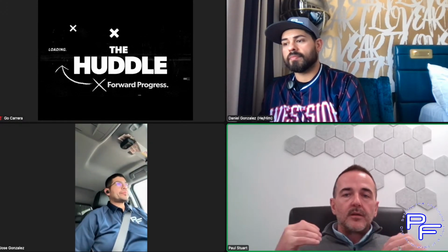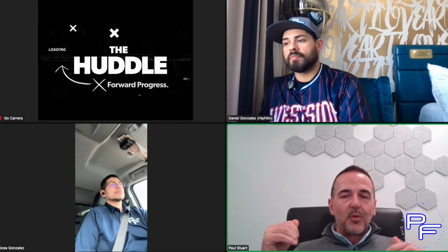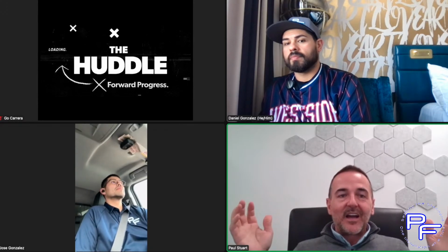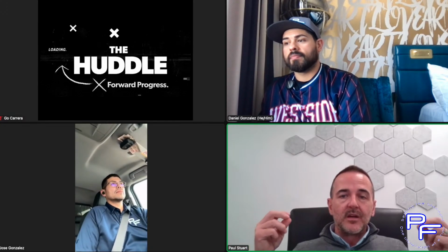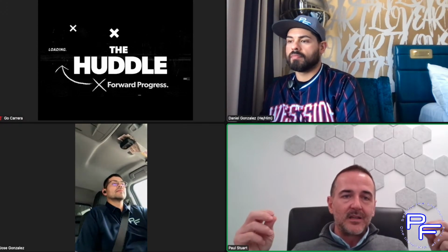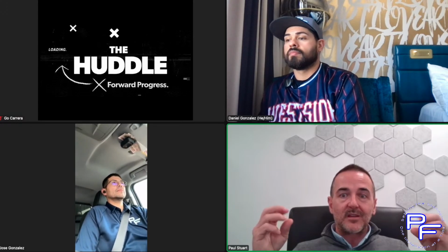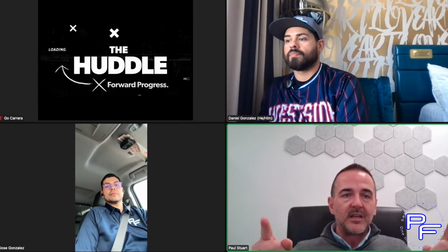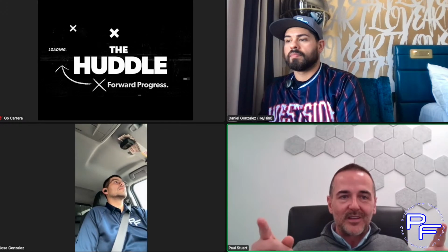So you can use something like that to go ahead and add it. One thing I wouldn't do, it's not a trick, is that I don't send out an RFI on it. If I feel like I have something that's going to make a GC question someone else's low bid versus mine, and I have a note I can put in there that'll make them think, oh my God, we've got to go with them, they read everything. This is obviously in the drawings because he listed the sheet and the detail number and everything.